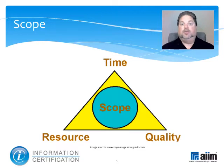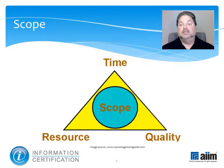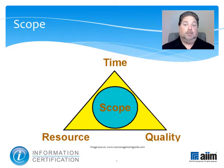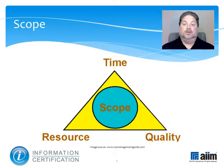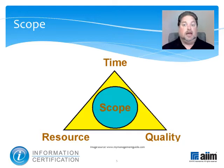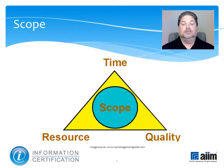The first step is to determine the project scope, which is the work that needs to be accomplished to deliver the specified features, functions, and ultimately results. A good job here makes it easier to detect and deter scope creep, which is not an unlikable person, but rather a term that refers to the incremental expansion of the project to include or introduce things that may not have been part of the initial spec, and do not lead to the adjustment of the schedule, resources, or budget.